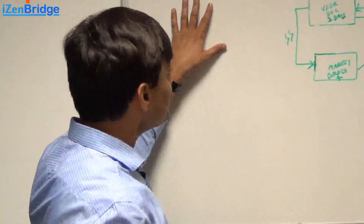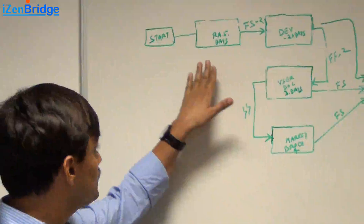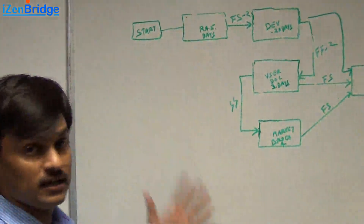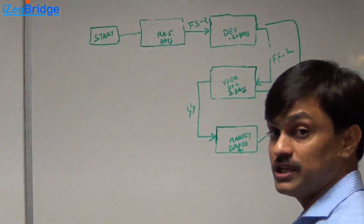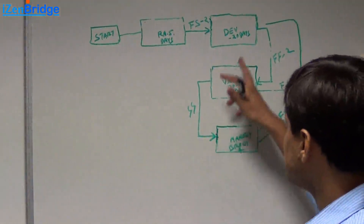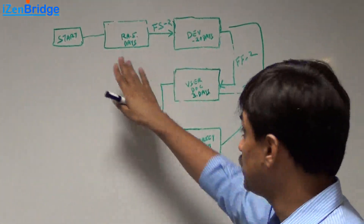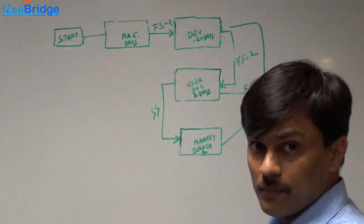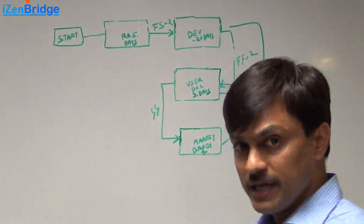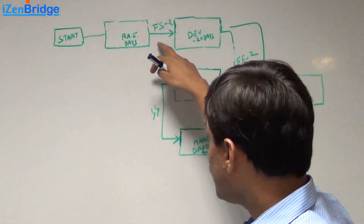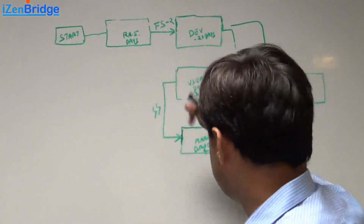We are starting a project with a requirement analysis activity. This activity will take 5 days and once we are done with requirement analysis, we will move to development. Development will take 20 days and we have a finish-to-start relationship between requirement analysis and development. We will lead the development activity by 2 days, meaning we are using an FS-2 relationship — so there is a lead of 2 days.